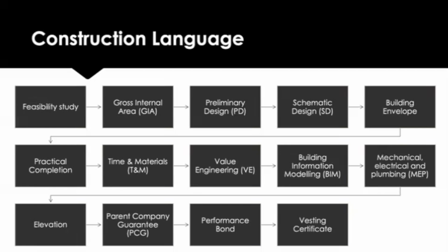And it's quite common to look for a performance bond as well, which is a financial guarantee to one party in the contract against the failure of the other party to meet its obligations. It's also referred to as a contract bond. But this performance bond is usually provided by a bank or an insurance company to make sure contractors comply and complete the designated projects, and they're usually somewhere between 10 and 20% of the contract value.